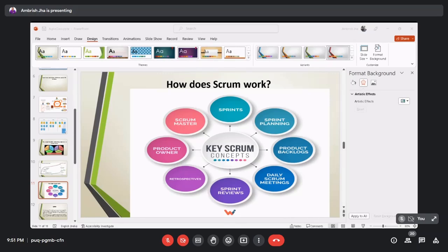So from the product backlog we are moving some of the problem statements or tasks into the sprint backlog. Then we are having grooming sessions. In the grooming sessions we discuss closely the problems, how we can deal with the challenge, and what the other requirements are. Maybe it is functional, maybe non-functional, maybe from the designs or from other engineering teams, where any communication is required. Everything is decided, and then we decide how much effort it will require.